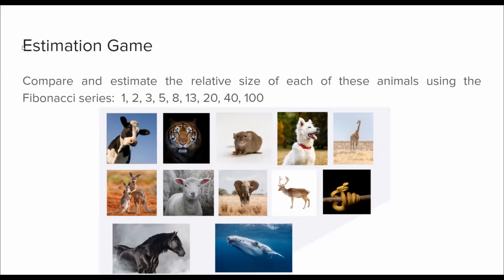But then when you need to place it amongst the other things, you very quickly realize that, oh, that last time I picked a 1-line change, it actually ended up over there on the right. Maybe I should ask those questions, or there was something not attached to the ticket, or it wasn't fully fleshed out. So yeah, I think that's probably the key thing that I've learned as I've been working with teams: to have that baseline always visible, that relativity being front and center of the estimation.